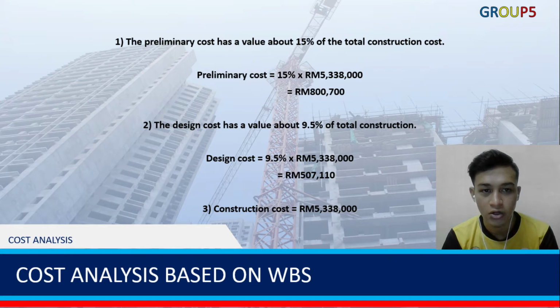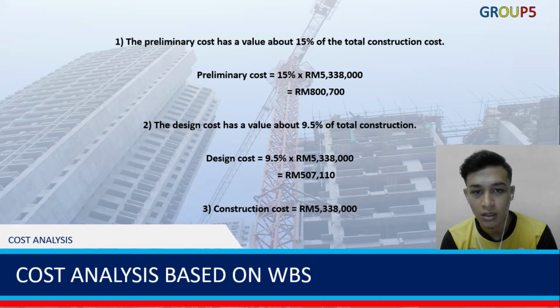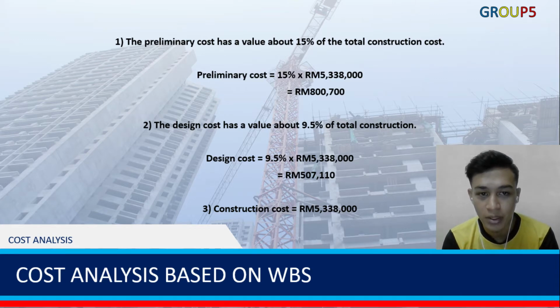Next, the cost analysis for our project. The first one is the preliminary cost. The preliminary cost has a value of about 15% of the total construction cost. 15% was multiplied by 5,338,000 ringgit, and the preliminary cost was 800,700 ringgit.